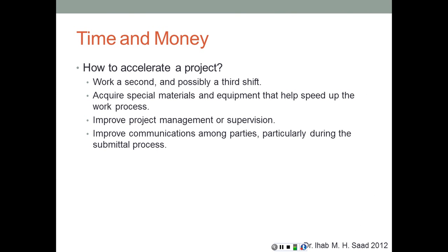Special materials and equipment that can help speed up the work process. For example, in concrete mixes, we can add accelerators that are going to accelerate concrete gaining enough strength so we can move the formwork faster and move to the next floor.